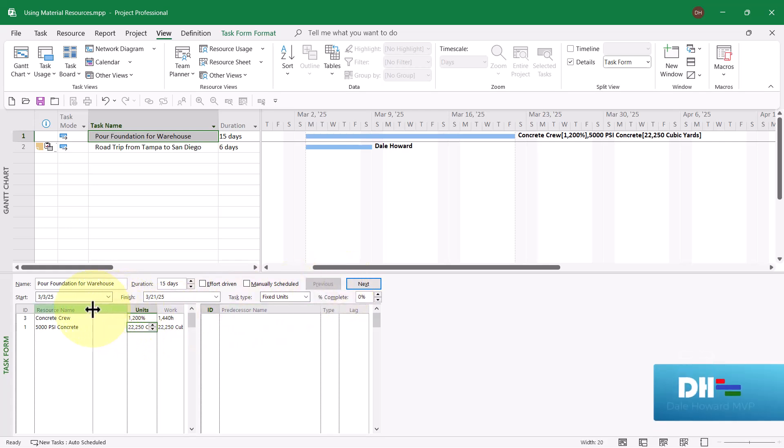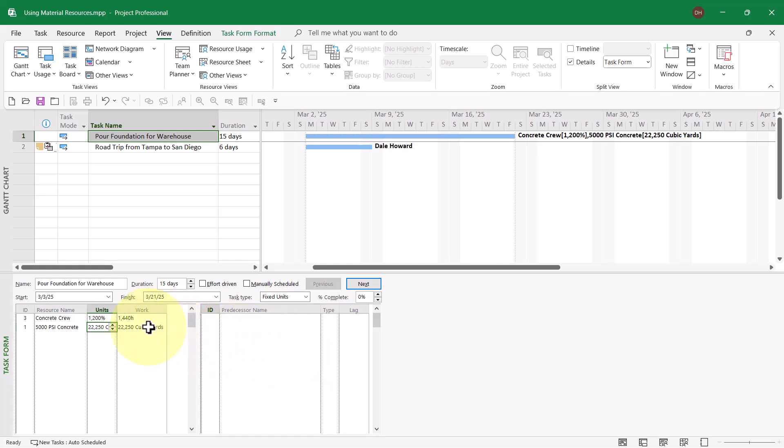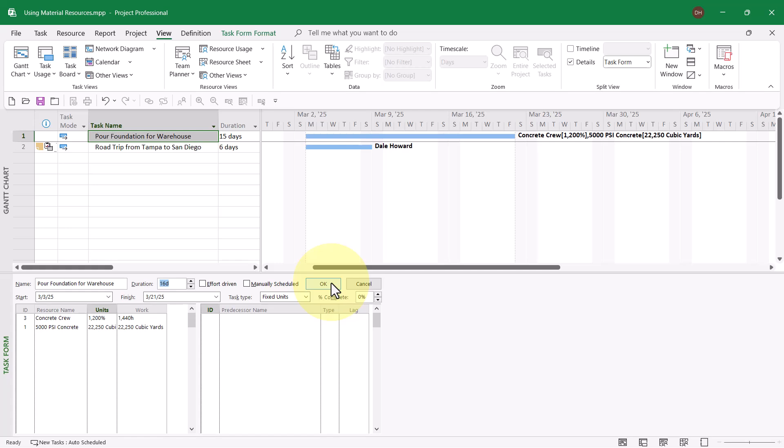I want you to notice what Microsoft Project just did. In both the Work column and the Units column, Microsoft Project entered the number 22,250 cubic yards. That's the amount of consumption that is fixed and will not change. So if the duration of the pour ended up taking 16 days, watch what happens to the 22,250. When I click the OK button, notice the number does not change. That's how to assign a material resource using the fixed consumption rate method.